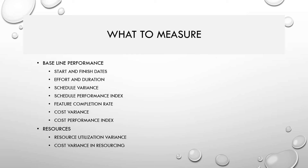Another set of metrics is baseline performance metrics — start and finish dates, schedule, effort, and duration. You can baseline your planned effort and duration for an activity or phase. Schedule variance is plan versus actual; Schedule Performance Index is actual schedule divided by planned schedule — it should always be greater than one, meaning you are ahead of schedule. Cost variance is the difference between budgeted cost and actual cost; Cost Performance Index is the ratio between budgeted cost and actual cost.